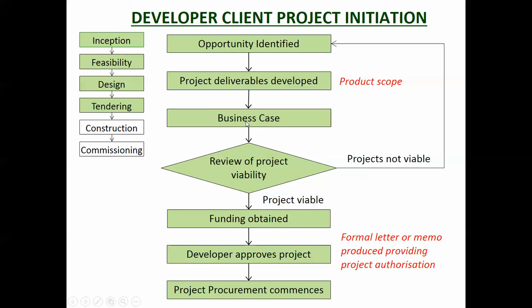This is how much it's going to cost us to develop this subdivision or to build this building, and this is how much money we're going to make out of it. And if you're going to make more money than what you've spent on it, considering time as well, then it's probably going to be viable if you're making enough. Some organisations will look at it and say, well, I'm only making 5%, hardly worth it. Oh, this one's going to be worth 10% profit, so it might be worth it. So that'll be the senior management, the people that own the developers. If the project's not viable, they're going to go right back and say, well, what else could we do with this bit of land?